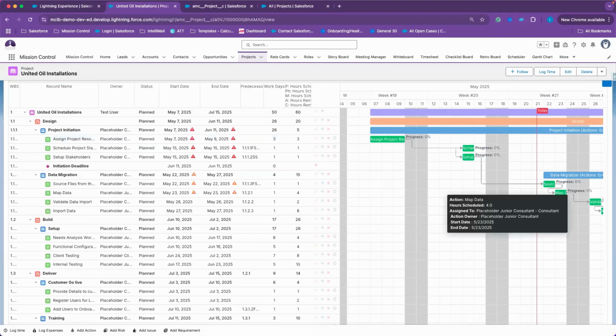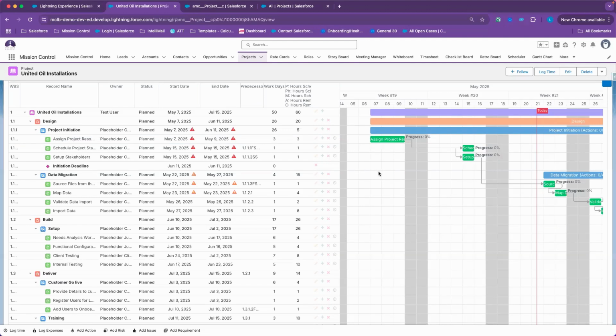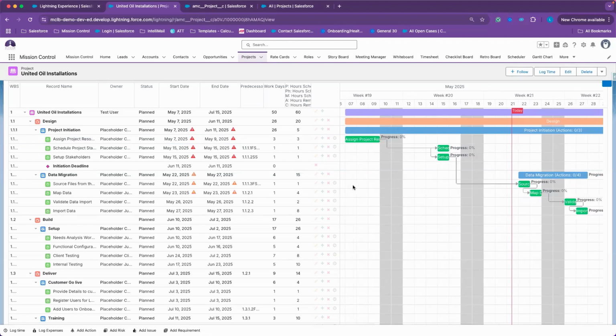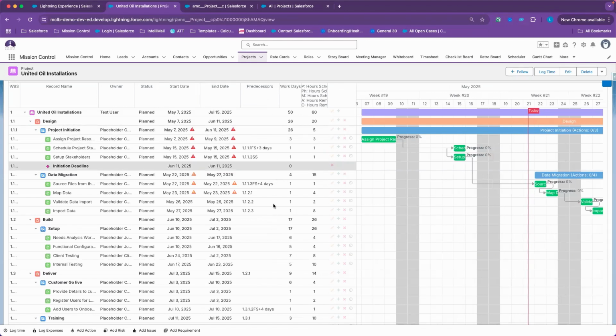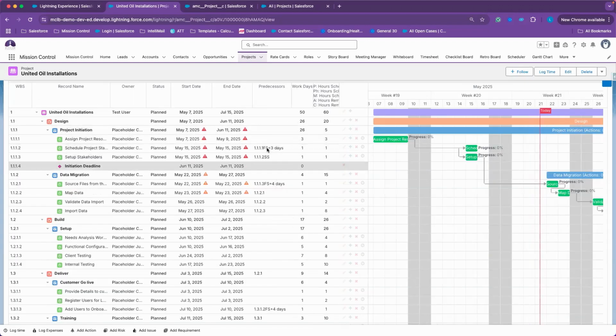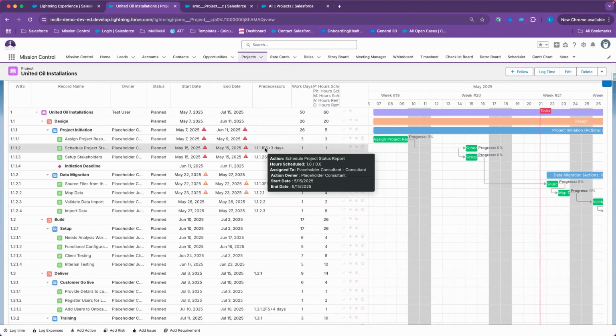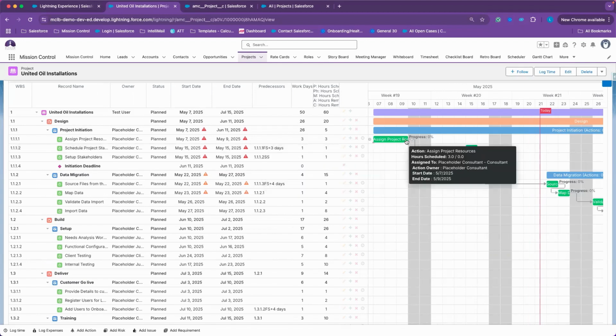And then we can go ahead and get into managing our dependencies. Now we have a few different dependency types. When this is enabled, you can choose to use the predecessors column with the WBS work breakdown structure to determine your different dependency relationships. Okay, we have 3 different relationships. We have finish to start, so that's when you drag from a parent to the beginning of a task.